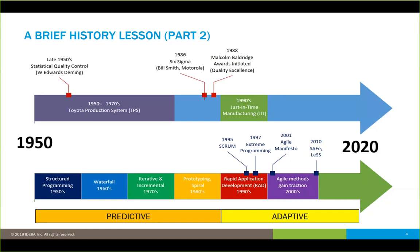The 1980s brought about things like prototyping and spiral. Those first four decades had a focus on predictive methodologies — really trying to turn development into a science so you could predict outcomes. But after that we started moving into more adaptive methodologies. That's when we brought in rapid application development in the 1990s, then the birth of Scrum in '95, extreme programming in '97, and the Agile Manifesto published in 2001. All of these methodologies, especially the predictive ones, have their roots back to the same principles of measurement and predictive metrics that came out of those manufacturing concepts.